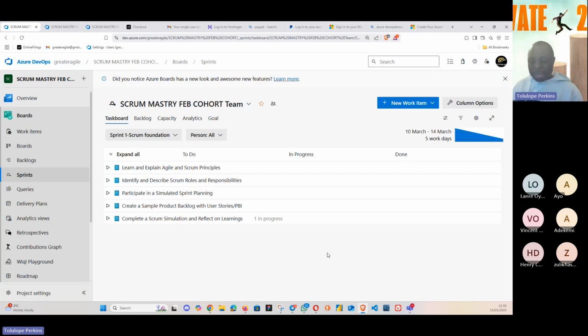So typically those are the inputs, and then the output is going to be refined feedback that we got from the review, and then a prioritized product backlog if there was anything that we needed to do.